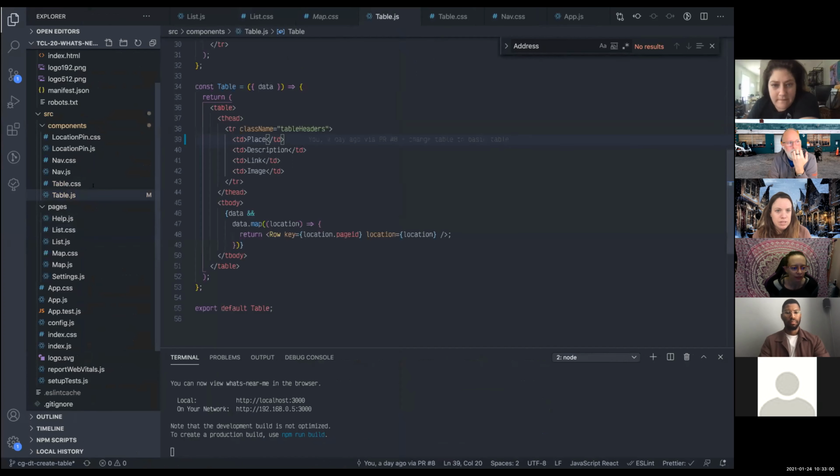In Scrum, teams typically assign stories points capturing relative complexity. That can be t-shirt sizes sometimes, like extra small, small, medium, large, extra large, or it can be numbers in a Fibonacci sequence. There are lots of techniques for assigning story points, and the whole point is to, over time, learn what your velocity is in Scrum. I think we talked about that before. So if you're doing the Fibonacci sequence, you start to learn, this team typically gets 20 stories done in a sprint or something, and then you can start to predict as a business what you're going to do.